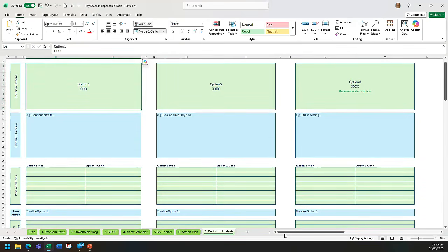In the group, you kind of just get this sense that, okay, it's going to be this one. And then if you can record who was there, who made that decision, then it's pretty easy to go to your business owner and say, hey, look, we had 3 different routes we could go. This is people I spoke to. This is the process that we went through. We've documented it all. This is a decision that we made. Do you accept this? And they go, yep.